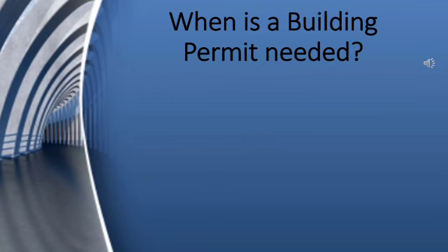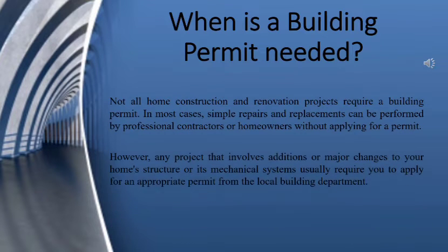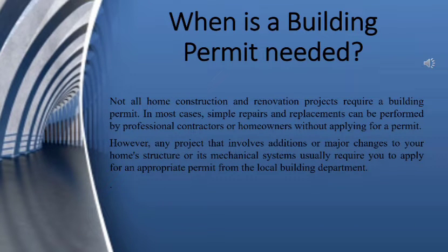When is a building permit needed? Not all home construction and renovation projects require a building permit. In most cases, simple repairs and replacements can be performed by professional contractors or homeowners without applying for a permit. However, any project that involves additions or major changes to your home's structure or its mechanical systems usually require you to apply for an appropriate permit from the local building department.